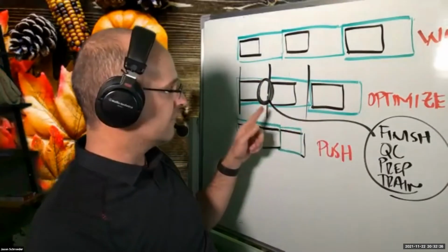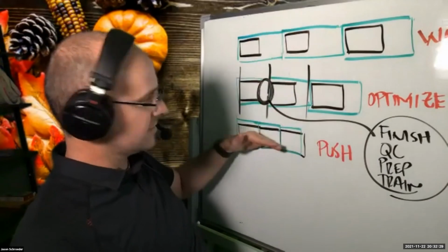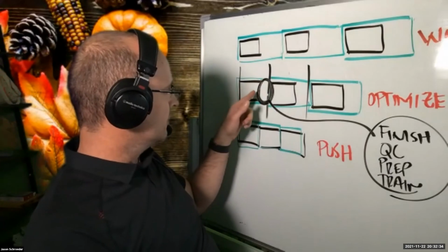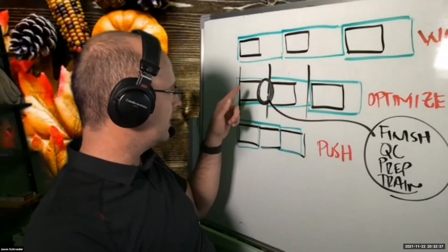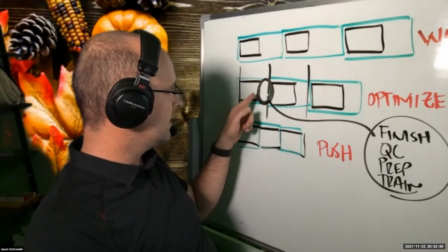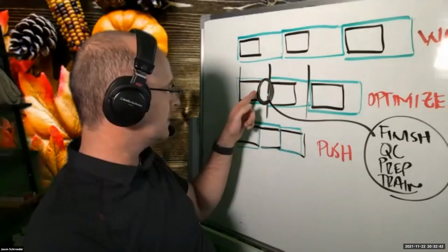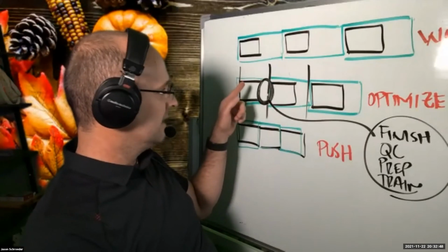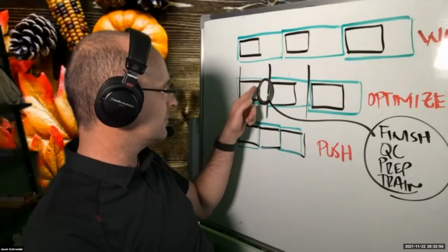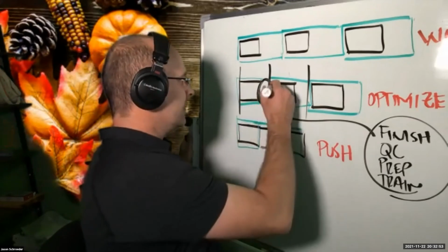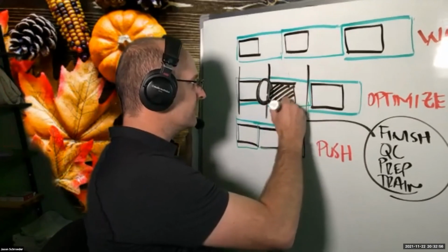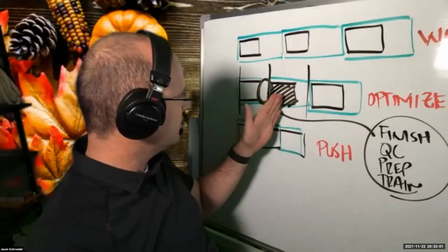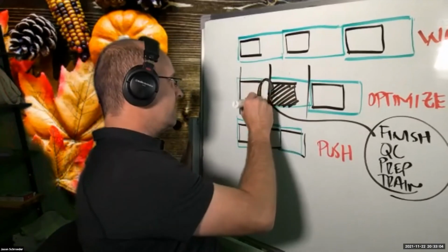And so that's why I like flow systems that are optimized, not too much waste and not too close together, to where when this activity is done, that crew stops, they sweep their area, they move their gang box, they QC their items, they punch list it, they walk the inspectors through, they snap out their lines, they stage their materials for the next area, they make sure to prepare their QC checklist, and they train their workers, and they ask themselves, how can I go even better and faster and more enjoyably on this end, which is again that sprint retrospective, right? How can I do this one better instead of, oh, we're done, let's go ahead and start the next thing.